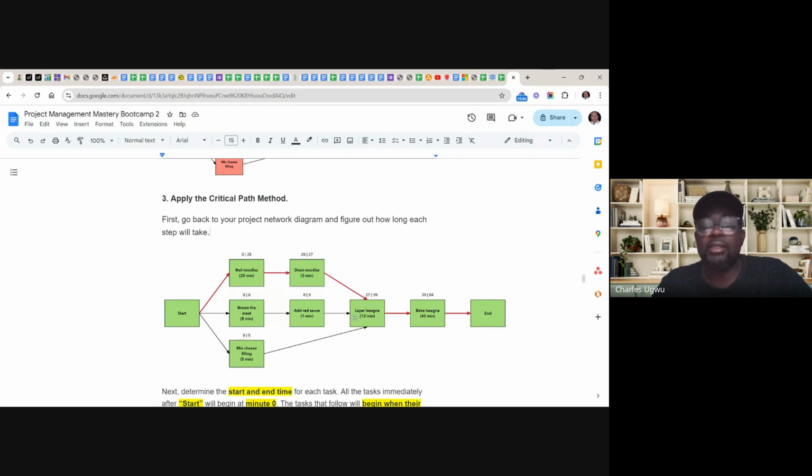So this is the logic why these areas are not critical. You see them here. These 25 minutes of boiling the noodle and draining the noodle have overridden all the time you can take to do all these things, meaning that you can assign these to people to do. After all, boiling noodle and draining noodle have no correlation with browning the meat. Where all of them meet is when you have to mix all of them together here before you can bake. So that is how the critical path works here.